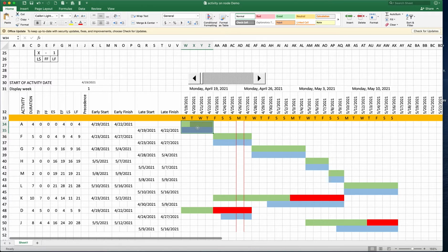Okay? So, this activity will not start unless this activity is finished. Of course, with the precedence here. But there are activities that are not dependent on some activities, so we can start them with respect to their early start or early finish, or we can also adjust them with respect to their free float.